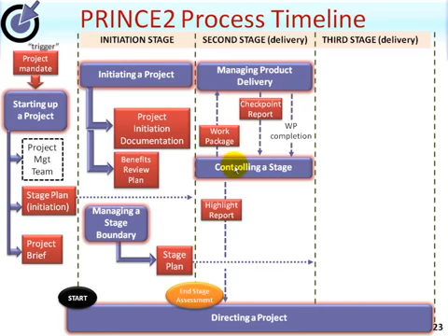Within a given stage, the project manager may have several teams, even some external teams, in which case work packages won't be given out singly, but in parallel, consisting of many. So it's worthwhile just considering that a work package may be given out one at a time, and only the next one given when that work package is complete, or they may be given out in parallel or some combination.